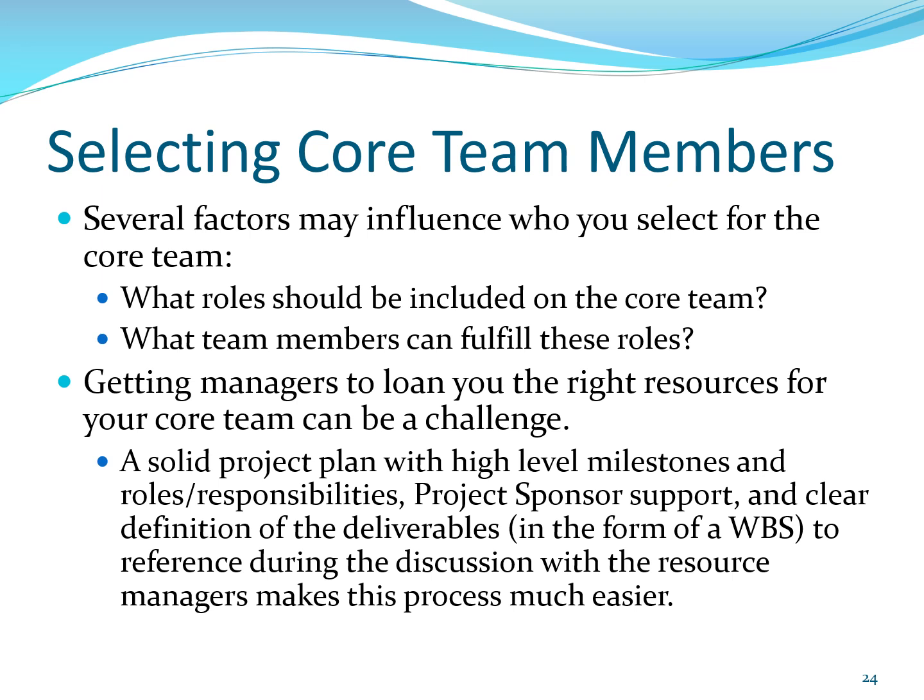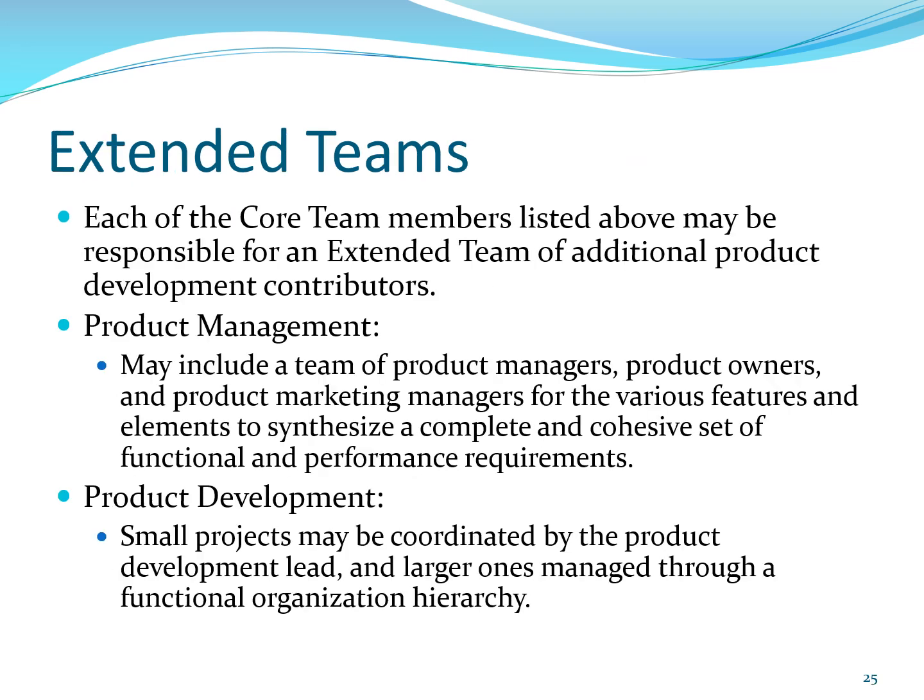Getting stakeholders, functional managers, and other resource managers to loan you the right resources for your core team can be a challenge. Having a solid project management plan with high-level milestones and roles and responsibilities, project sponsor support for the initiative, and a clear definition of the deliverables in the form of a WBS to reference during discussion with the resource managers makes this process much easier.